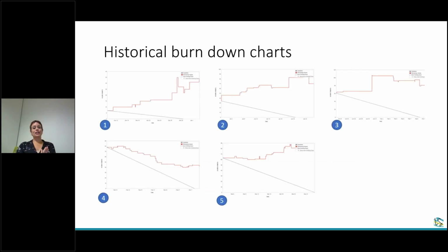In addition to that, these are their burn down charts. Now, if you're not used to using burn down charts, I just want to emphasize that the legend for these guys is in the upper right-hand corner, because from a UX perspective, no one should ever be up there. So you can see that there's data that is obscured by the legend, and that's because a burn down chart is supposed to go down, not up. So this was a big red flag.